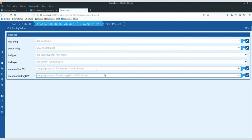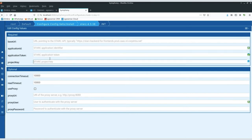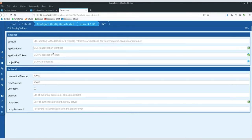One key recommendation: please get your credentials from Daimler as soon as possible. We have already seen cases where a project started but the customer had not yet obtained credentials to log into the OEM portal. Everything is ready on the Daimler side to get you onboarded. What you need is the API token, the application ID, and of course the project key.